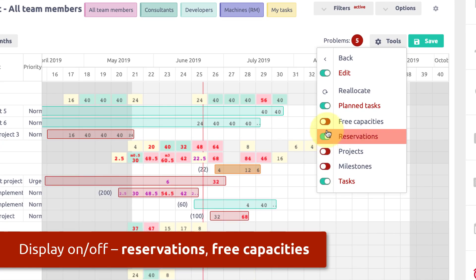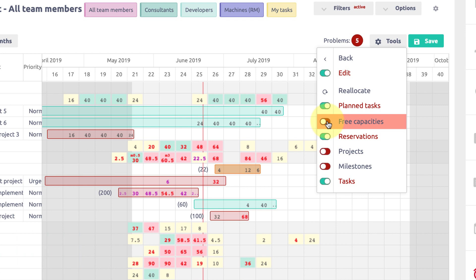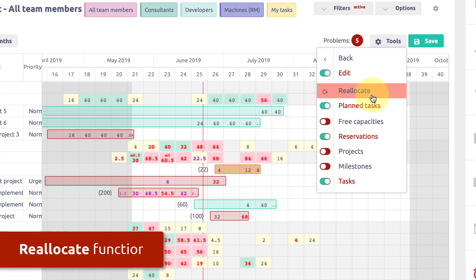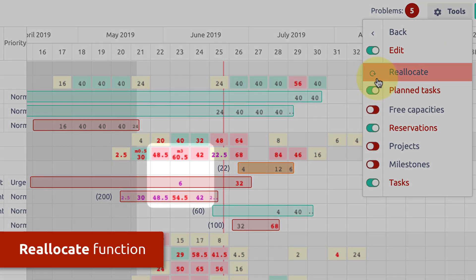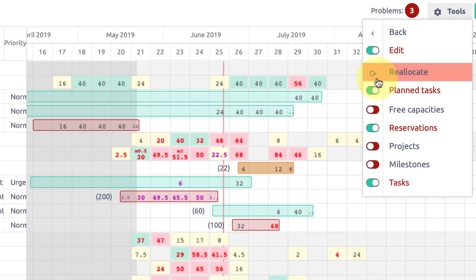Moreover in this menu you can also find a reallocate tool which allows you to evenly distribute workload and allocate all the unworked hours to the future.